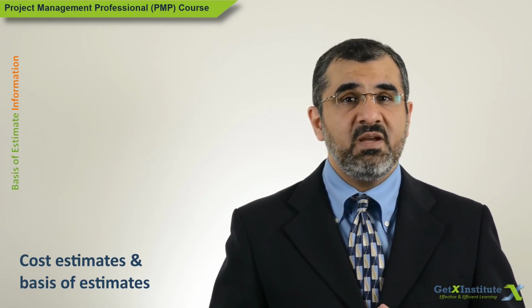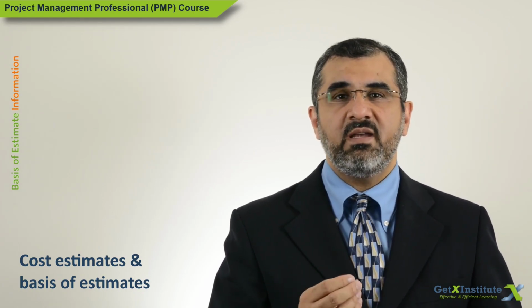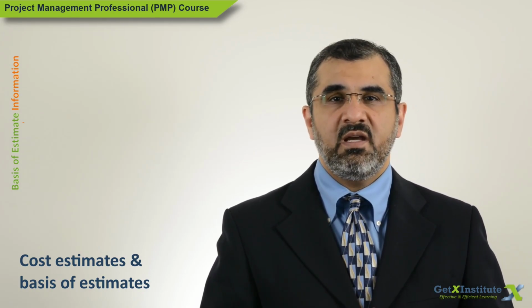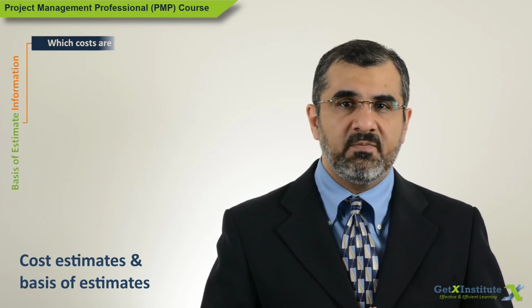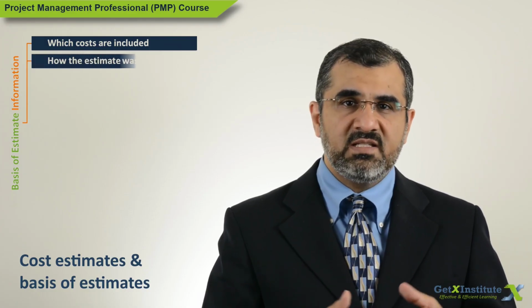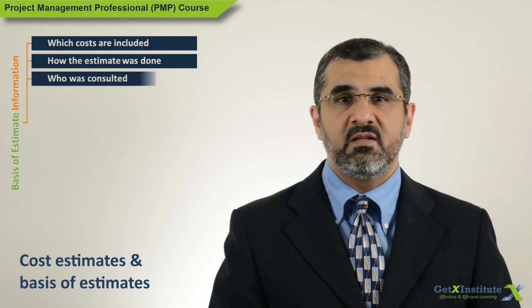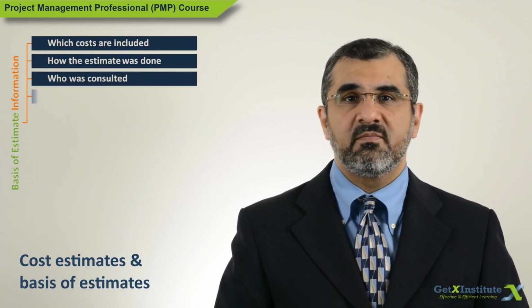The basis of estimate will help in this case. If properly documented, it can provide a wealth of information. It will provide answers to questions like, what are the various costs included in the estimate? How the estimate was done? Who was consulted? Which method was used?